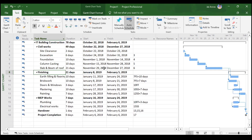Now we will be creating the WBS codes, which are nothing but your Work Breakdown Structure codes. For example, IT building construction is the main package, so we can assign it code 1. Civil works will be 1.1, finishing will be 1.2.